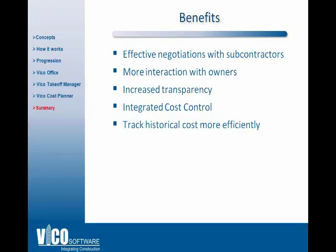You will be able to facilitate a more transparent interaction with the owner. You will be able to help the owner understand where the different cost changes come from and this increased transparency will help the general contractor become a trusted partner with the owner. You will be able to extend the estimate to cost control and build a database of actual costs and use those actual costs for estimating on new projects. So you will be able to track cost historically at a higher level of detail and eventually estimate more accurately on new projects.